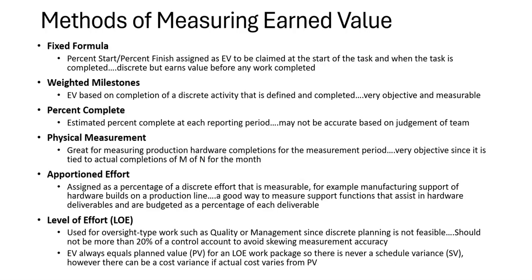That's a little bit prone to gaming the system by claiming high earned value up front and then letting it degrade as you're actually working on the task until the point where you have 20% of the task left to complete and you only have 5% of the budget. So now you're going to go negative. I don't like that method at all. It's too subjective.